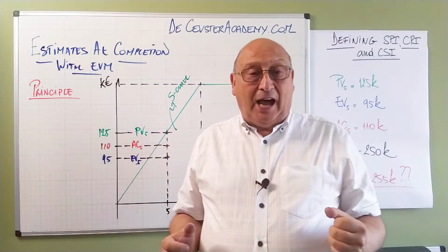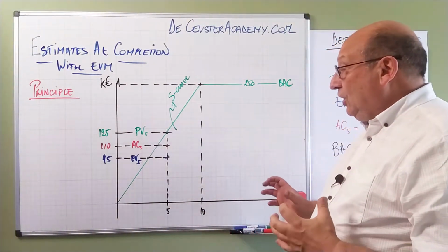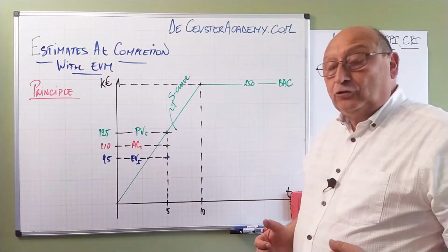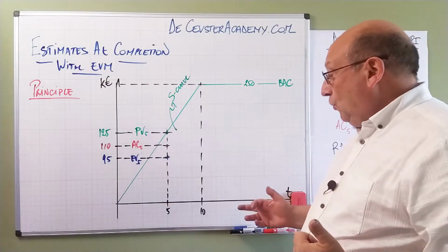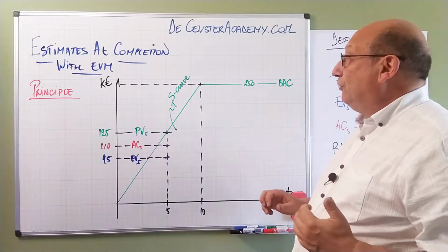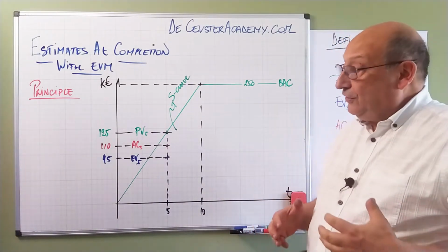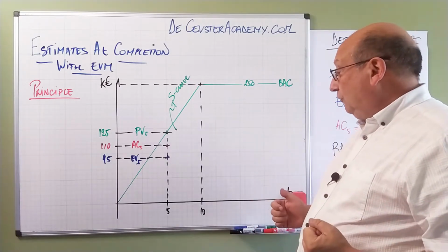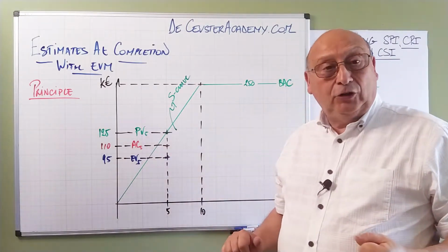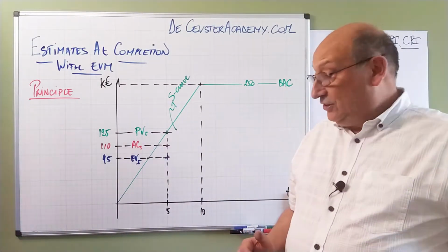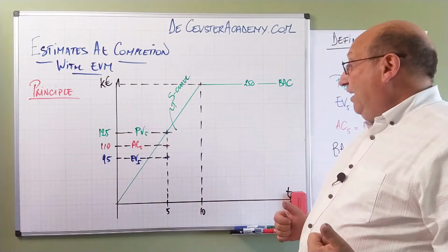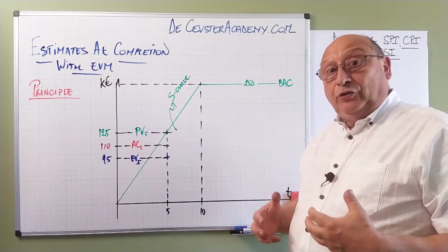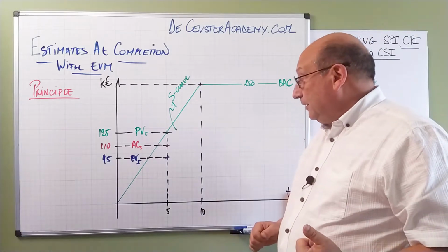In order to do that, I start with a small schedule here where I have the S-curve over 10 periods with a budget at completion of 250K. We have a line, a linear evolution of the S-curve. It's easier for our calculations, for our extrapolations. Now, first of all, we find at period 5 that the planned value was 125K, which is basically in the middle. So we have 125K that was expected to have been reached at the 5th period.